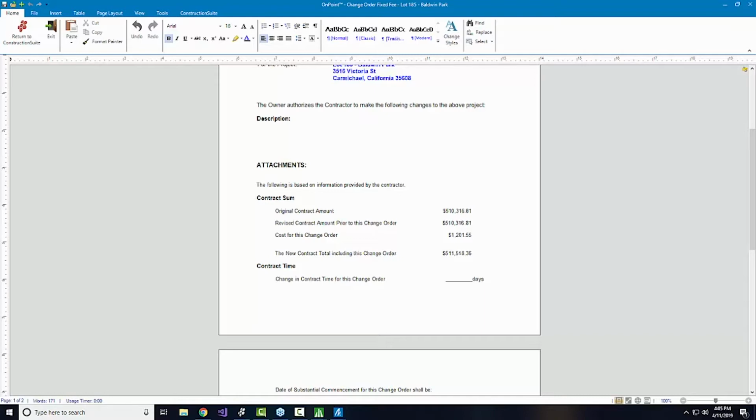Holly, you kind of touched on something that I think is really important. In all my years working with construction and doing some of our own construction as well, I have never found a company who really, really loved change orders. Never once. The most common mistake I see with change orders, I guess the second most common, is not charging appropriately for those change orders. The most common is not getting signatures and not putting together the documentation, because then it's easy to contest. And that usually comes in for those markups.